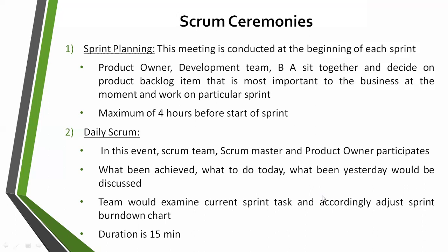Fine. Coming to the point, as I'm reiterating once again, we have four Scrum events. The first one is planning. We need to plan what needs to be done in the next sprint. Sprint is a time-boxed event for the work to be done over the next 2 weeks, which is 10 days. We discuss what needs to be taken into consideration for the next 2 weeks. That is the sprint planning method.